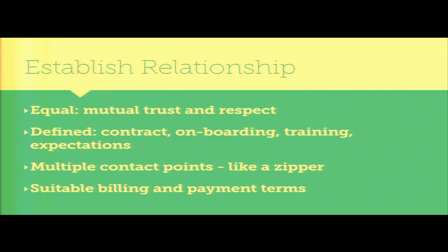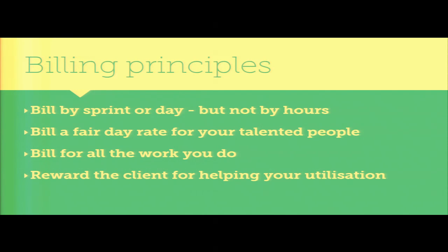You need to be paid on time, and enforce that as a matter of respect. Stop projects if invoices become late. Pause things, and they'll soon get to pay. It's just a simple matter of equality, trust and respect. So the relationship is key.